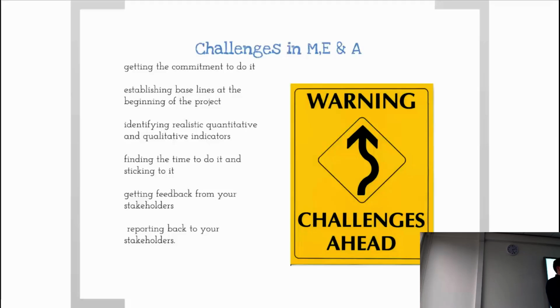In the UK we are very bad, because one thing is very clear: once we have planned these monitoring, evaluation and assessment activities of sustainability, we realize that there are costs attached. And after the project is completed, it is a very simple thing to just cross them out and save costs. So in the UK, the Green Deal was never followed up to see if it actually achieved the value it strived to create, if there was actually a more sustainable performance, if energy use was actually improving. So there's a big question whether that is the case. Getting the commitment to do it and following it through is one of the biggest challenges.